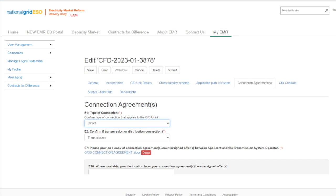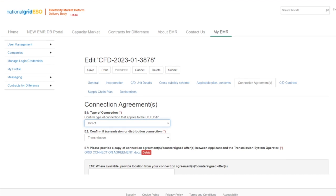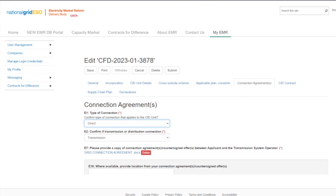Where a direct connection applies, a copy of the connection agreement applicable to the CFD unit is required. Where a partial connection applies, the applicant must provide a copy of the connection agreement, and if the owner of the CFD unit is not the owner of the private network, a copy of the private network use agreement is also required. Where an islanded CFD unit connection applies, a statement confirming no direct or partial connection exists or will exist in the future is required, plus a private network use agreement if the applicant is not the operator of the private network.